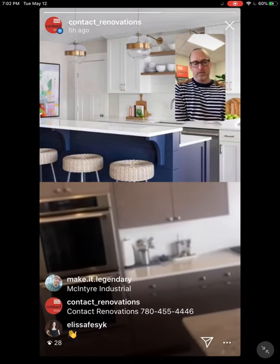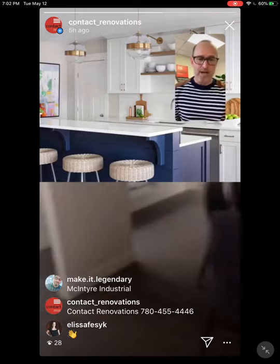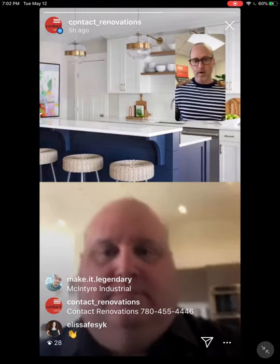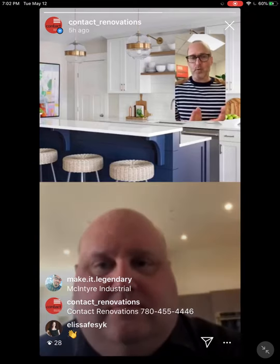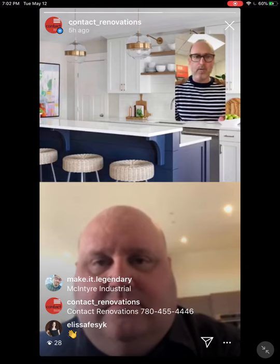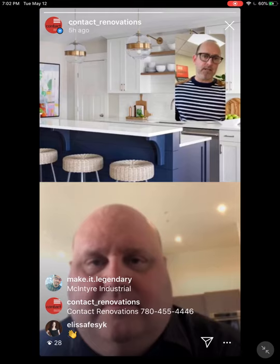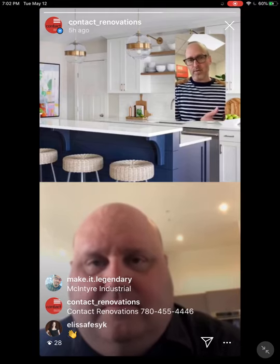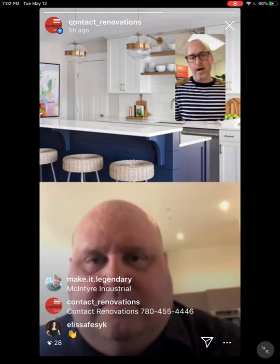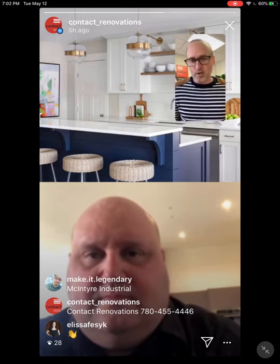Someone had a budget. Our average kitchens, I'm talking a kitchen renovation, so new cabinets, countertops, backsplash tile, new flooring, all your wiring, your lighting, all that stuff, run between, I'd say, $60,000 to $70,000 all in. Then we do a bunch a year that are in that 30 to 50 range. Those are generally an IKEA kitchen. Or we do the $100,000 plus kitchens, which is usually either a very large kitchen, a very high-end finish, or lots of design features. Something like the house that you're in now.